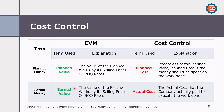When it comes to actual money in earned value management, we call it earned value — the value of the executed work by its selling prices or the BOQ rates. While in cost control, the actual money is called actual cost — the cost that the company actually paid or is going to pay for the executed work done. If we are not performing cost control, earned value will always equal actual cost. But if we are performing cost control, you will find big differences between the earned value and the actual cost.